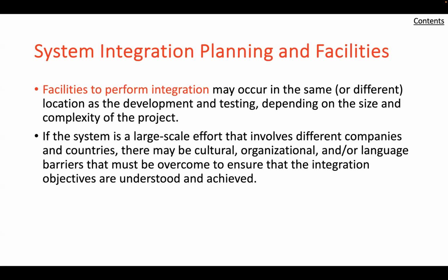Thus, experience has shown that no matter how thoroughly the individual components have been tested, there almost always remain unforeseen incompatibilities that do not reveal themselves until the system elements are brought together. Such discrepancies usually require changes in some components before the integrated system works properly. These changes in turn frequently require corresponding alterations in test equipment or procedures and must be reflected in all relevant documentation.